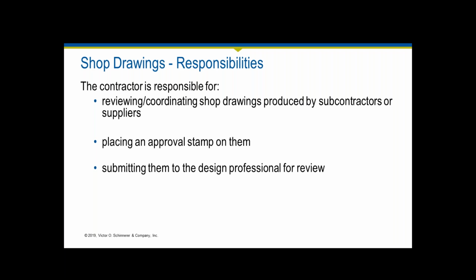Only review the shop drawings that have been required of the contractor. Again, your job is not to make the contractor's job easier by doing their work for them. If a particular submittal is not required of you in the construction documents, but the contractor sends it to you, make sure you respond back saying this is not required, it's not on the schedule, we don't need to review this, it hasn't been asked of us. That has a twofold purpose. Number one, you're not spending your time on something that you haven't been paid for, and number two, by not reviewing it, you're not assuming responsibility for something that hasn't been asked of the contractor, and so you're not taking on responsibility for that.